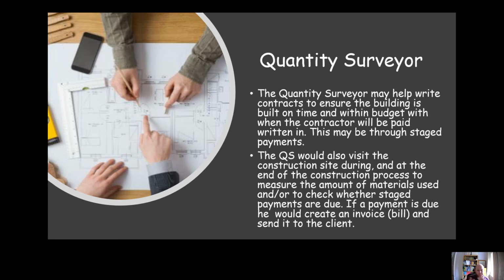When the external walls have been built, or the carcass has been built, there might be another stage payment. When all the pipe work's been installed, there might be another stage payment. When all of the first fix is complete, another stage payment, etc., etc.